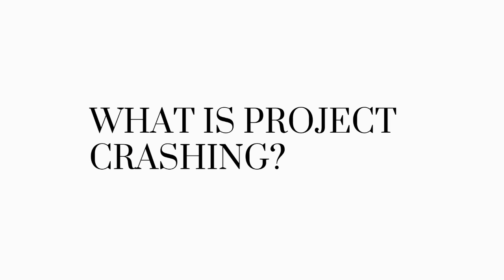My name is Matabalao, and today, for my part in Chapter 12, is what is project crashing. So, at times, projects have deadlines that may be impossible to meet using the normal procedures for completion of the project. However, by using overtime, working weekends, hiring extra workers, or using extra equipment, it may be possible to finish a project in less time than is normally required. However, the cost of the project will usually increase as a result. When CPM was developed, the possibility of reducing the project completion time was recognized. This process is called crashing.